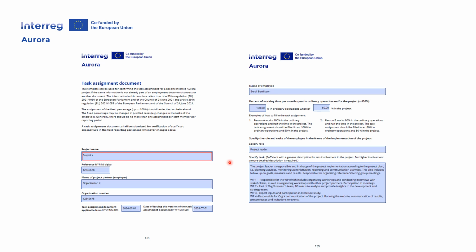When you describe each person's tasks in the project, connect the descriptions to the different work packages according to the activity plan in your decision. Remember that you should describe the tasks for the entire project duration and not just the period.